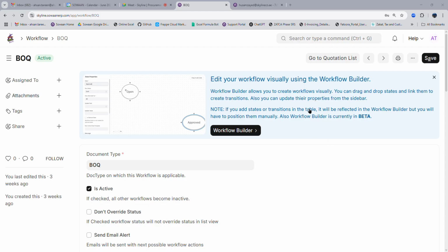So Hammam has to make sure that for each project, at the time of BOQ or signing a contract, the particular virtual warehouse for the same project is also created for requesting the items and keeping control under the same location warehouse, same project warehouse. So this is how you save it and submit it.